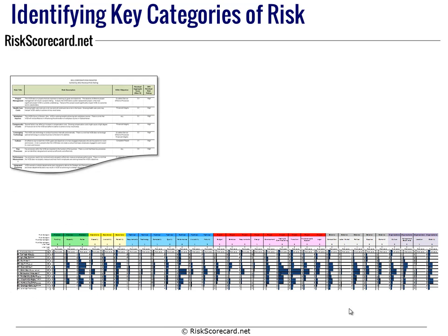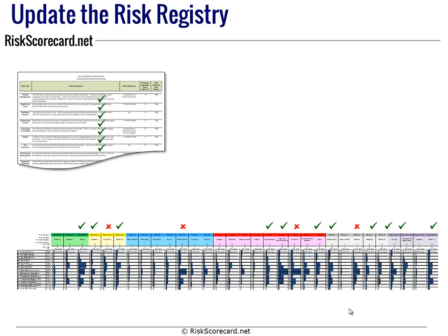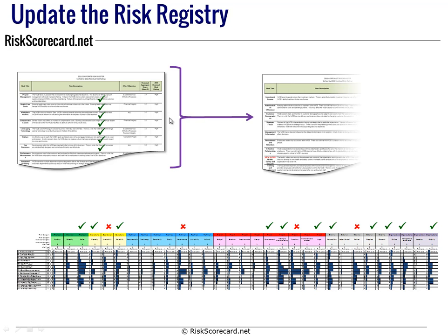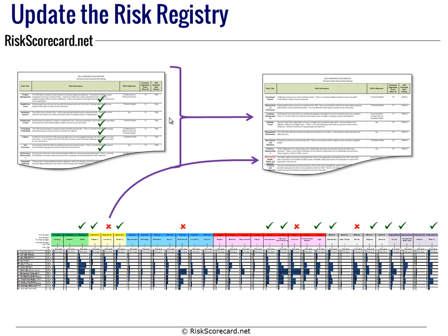So that begins to allow us to take this analysis and compare it to your existing risk register. So in some cases, you'll find that risk already exists in the register, in which case, give yourself a green check mark. In some cases, the risk doesn't exist. So by the time we're done the analysis, in this case, we found 4 areas where we have categories of risk that we did not identify on the previous risk register. So we should take the existing register and work that forward by adding in those risks that we've identified that are above and beyond what we initially had.